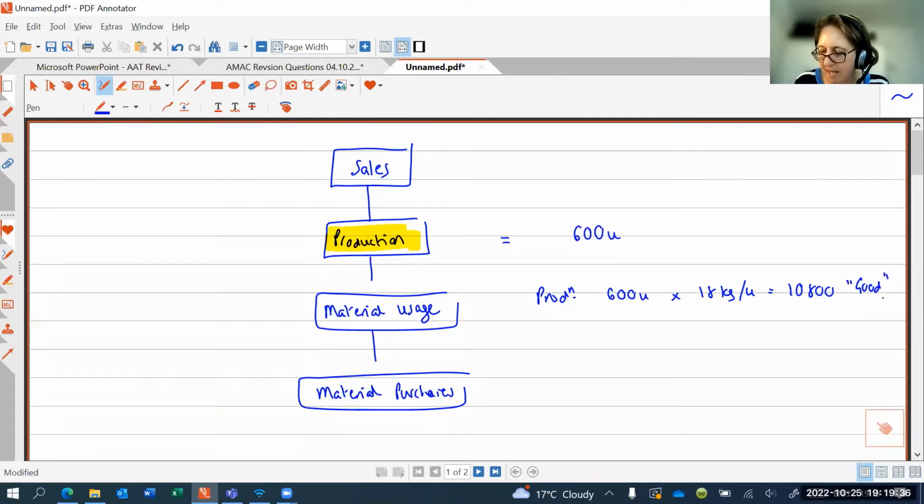And what I mean by that is after wastage has been accounted for. So after I've wasted them, I need 10,800 left. Wastage is 6%. Would anybody like to help with how we might actually then gross up this 10,800 to account for my 6% wastage?